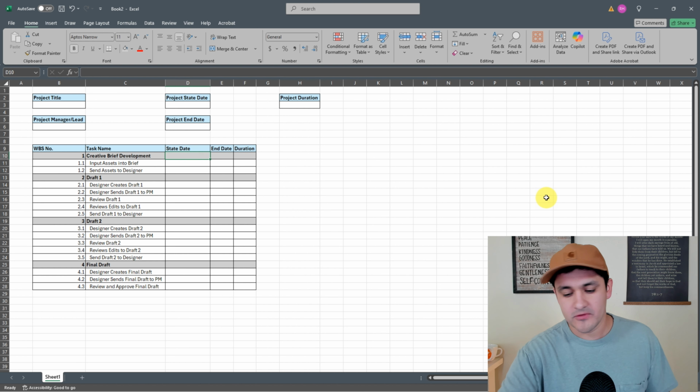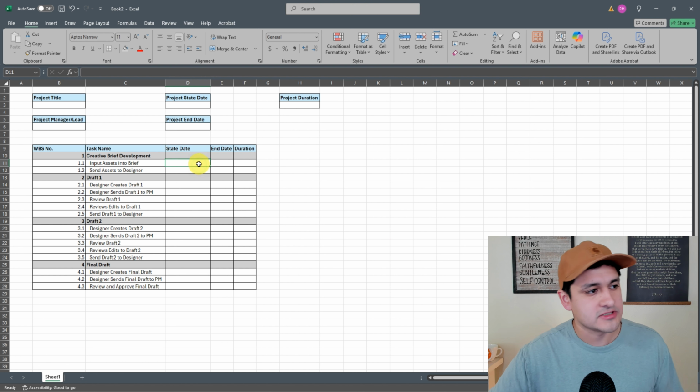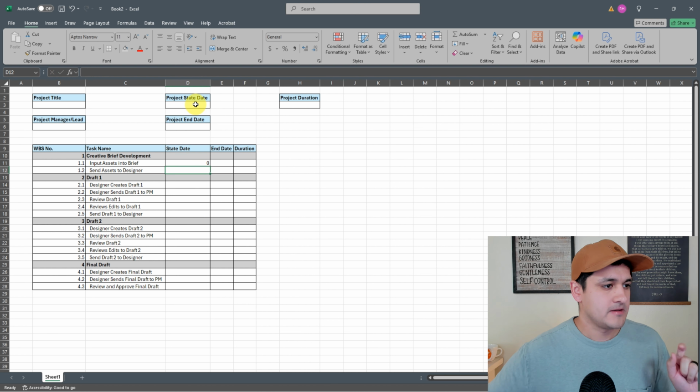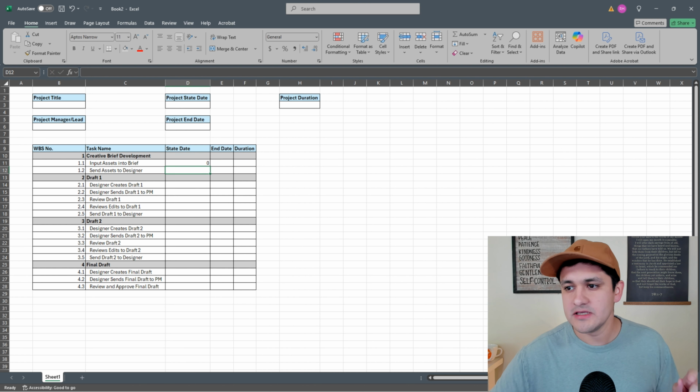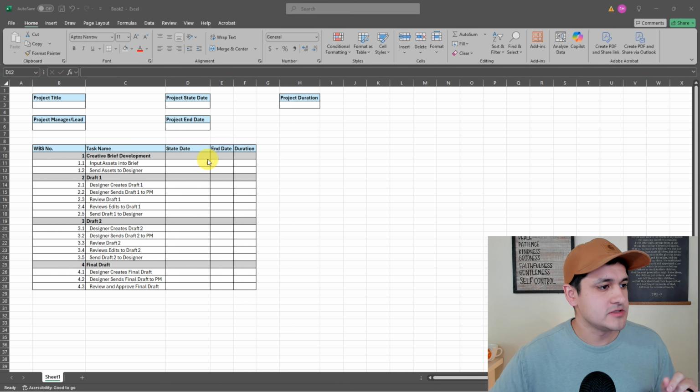We're gonna first say the high level start date. Actually, what I'm gonna do is high level formulas here, but I'm just gonna do the subtask durations, and then you'll see what I do up here and what makes up this. So the start date of my very first task is gonna equal the project start date, right? So whatever this is, it's gonna equal that. But actually what I need to do is an if statement because I want this to be clean.